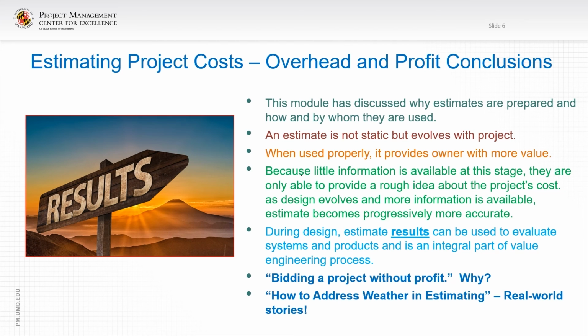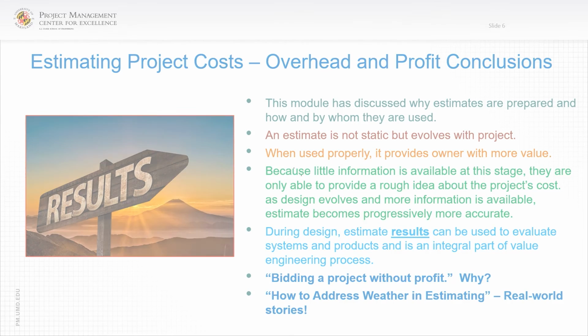When you bid a job, you should bid it and schedule it based on normal weather conditions. If you encounter unusually severe weather conditions, generally, with the proper backup, you can justify a time extension for weather. So it was a good lesson learned. Don't put unusual weather conditions into your baseline schedule.